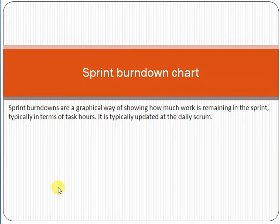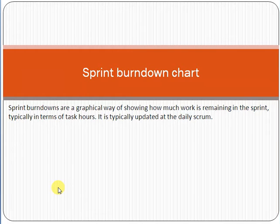This is the concept of the scrum framework. In the scrum framework, we have a chart called the sprint burn down chart. Whenever we start a project using scrum methodology — which is used to manage software projects — a sprint burn down chart is a graphical way of showing how much work is remaining in the sprint, typically in terms of task hours. It is typically updated at the daily scrum.